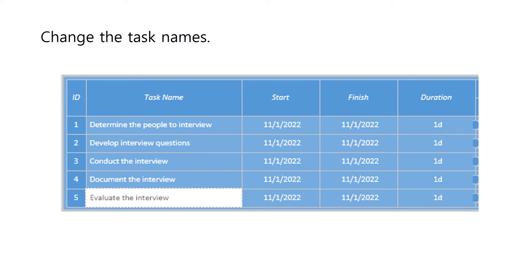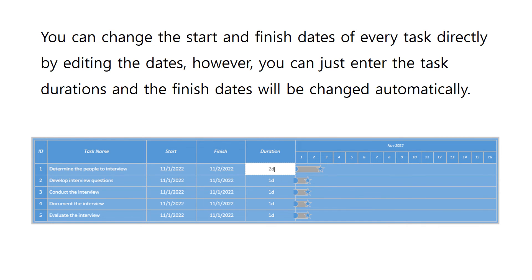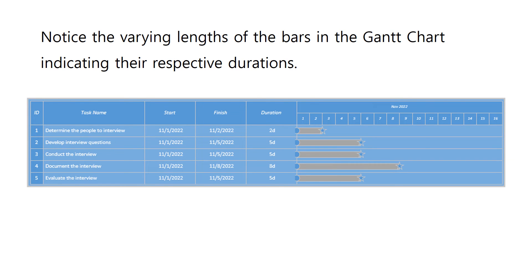Let us now change the task names. You can change the start and finish dates of every task directly by editing the dates. However, you can just enter the task durations and the finish dates will be changed automatically. Notice that if you change the task duration, the task bar on the Gantt chart also changes. Notice the varying lengths of the bars indicating their respective durations. Also notice that all tasks are starting on the same date, since we did not yet link the tasks to each other.